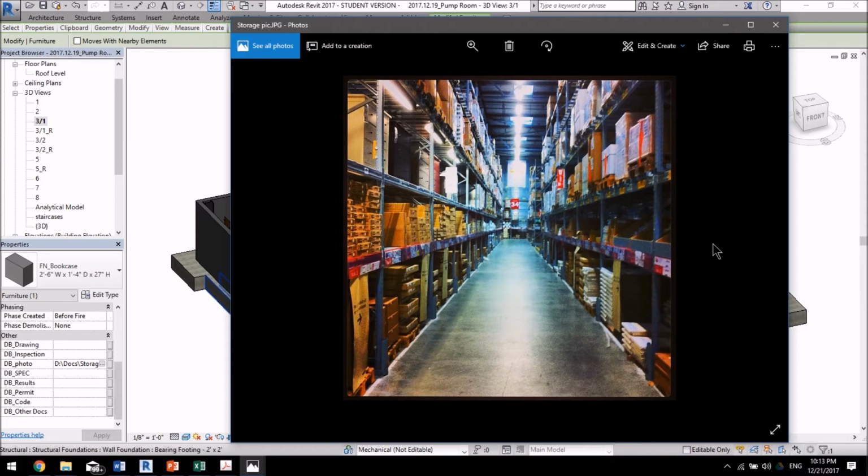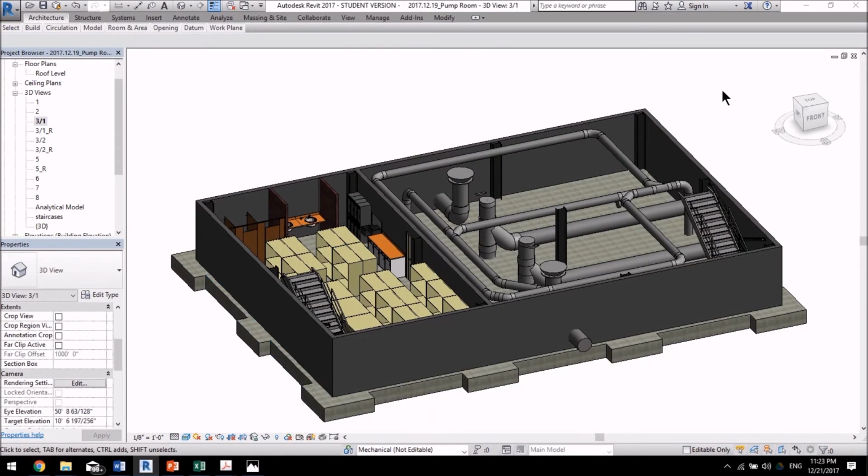When the fire started, the welders realized that despite the standard obligation, among the materials stored in these shelves, there were some containers of flammable liquids which added to the intensity of the fire. If these containers had not been there, the welders might have been able to extinguish the fire and prevent further damages.